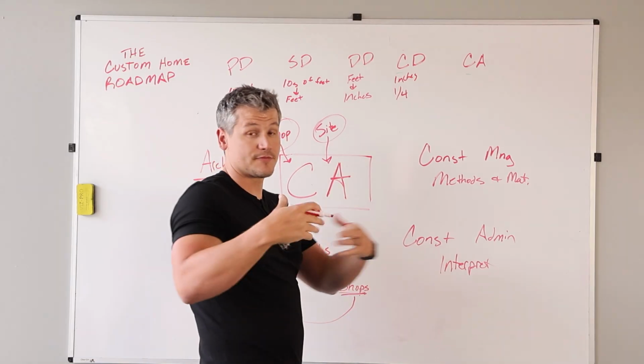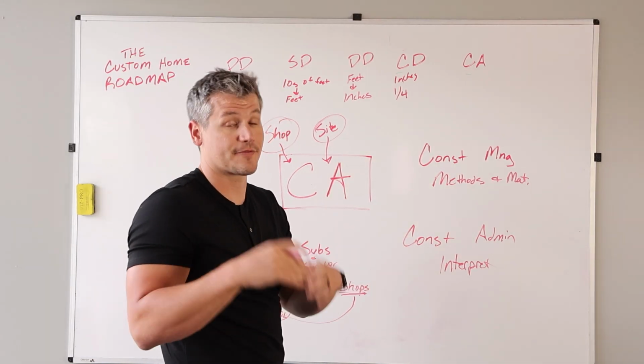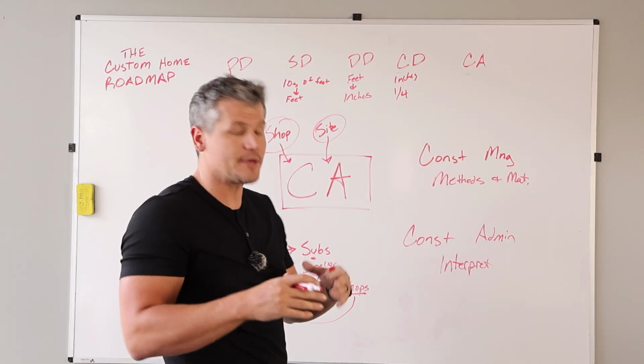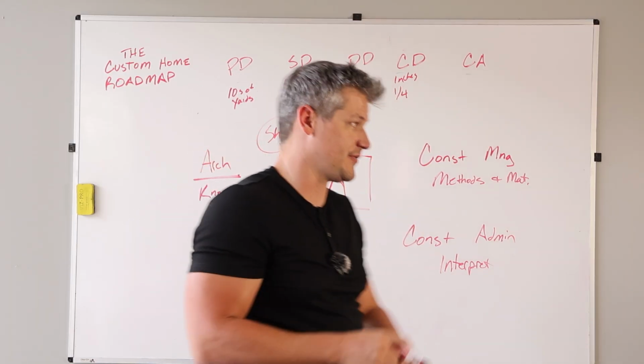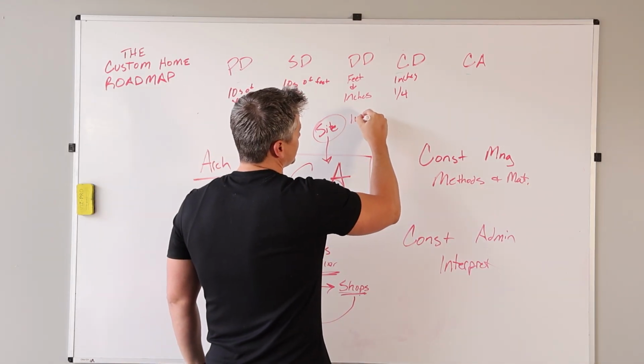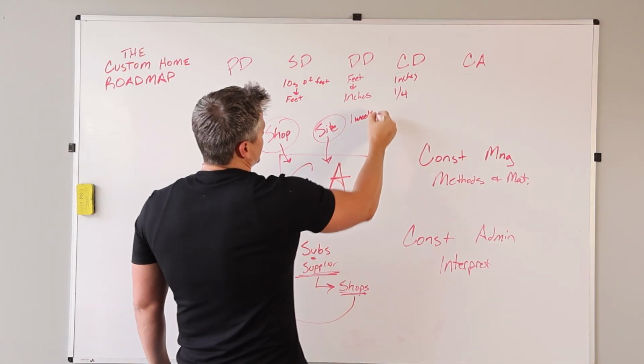But we're also looking for misinterpretations even in the field. There's people out there framing the house, putting in HVAC. There could be a misinterpretation at a detail level. So us coming out there once a week is usually pretty common. That's going to be important. I said week, it's week.